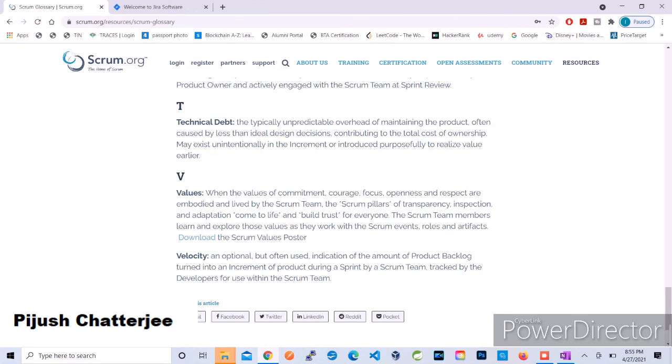If you take a sum or average of 5 different sprints and find you are completing between 25 and 35 points, your velocity would be about 30, and over time you can measure whether your velocity is increasing or decreasing. It is solely for the team members, the internal Scrum team only. It is not for higher management.